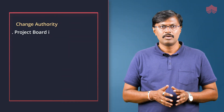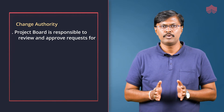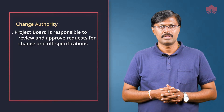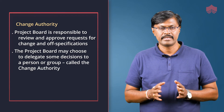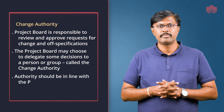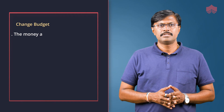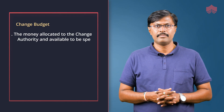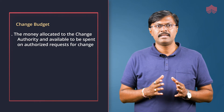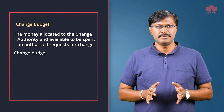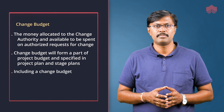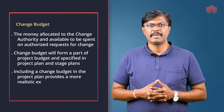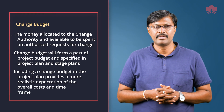Change authority: the project board is responsible to review and approve requests for change and off specification. The project board may choose to delegate some decisions to a person or group called the change authority. Authority should be in line with the project management and control requirements. Change budget is the money allocated to the change authority and available to be spent on authorized requests for change. Change budget will form part of the project budget and is specified in the project plan and stage plans. Including a change budget in the project plan provides a more realistic expectation of the overall cost and timeframe of the project.